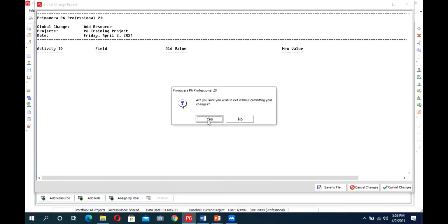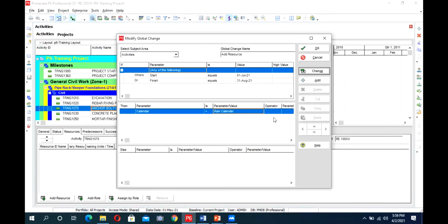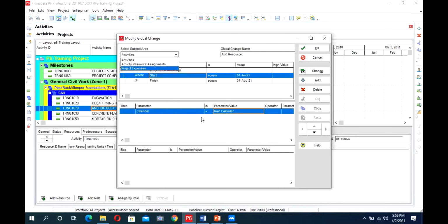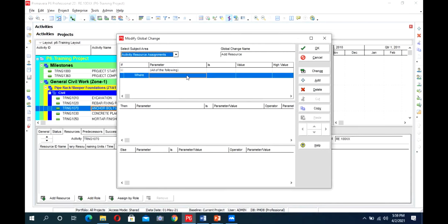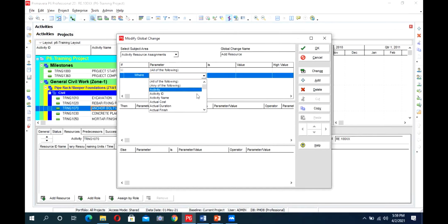In this, you can have a lot of different types of options, just like in Excel, where we make a lot of formulas like VLOOKUP or SUMIF. Similarly here, you can define a lot of logic. But still, it is very limited: you do not have options available to do every work. You cannot assign the relationships from here. Similarly, we can change the already included resources, but we cannot add a resource here. We can change our resource curve from here, but first we have to add it manually from the activity detail bar.